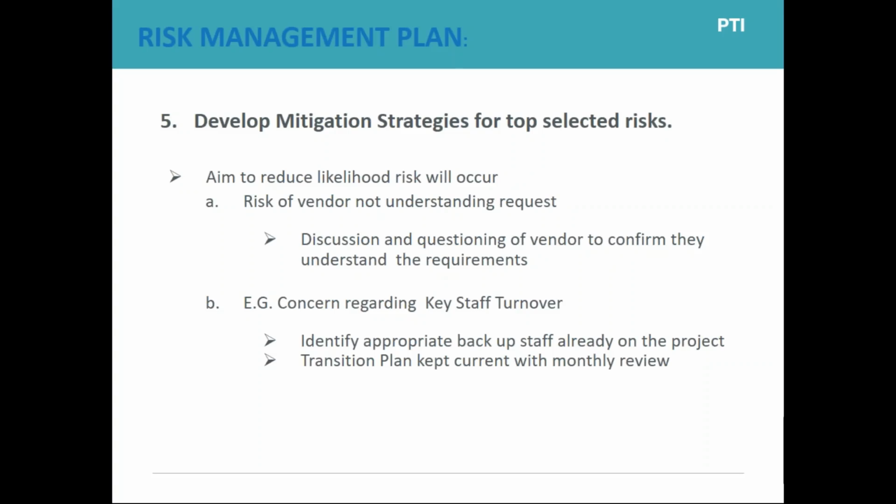But you've selected your vendor, they're doing a great job, but you've got a concern because you know that everything hangs on their very expert project manager. How are you going to mitigate if that project manager is promoted or leaves, is sick? What are the plans in place so that you can work with your service provider to mitigate?